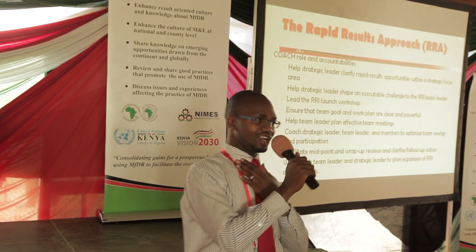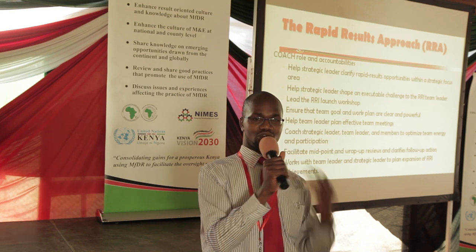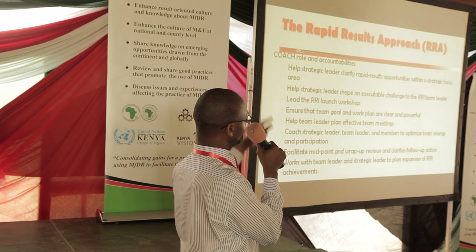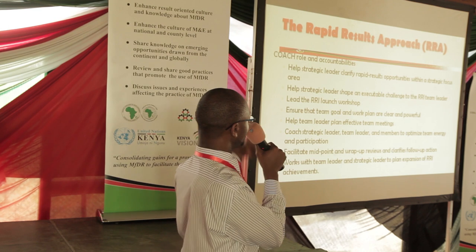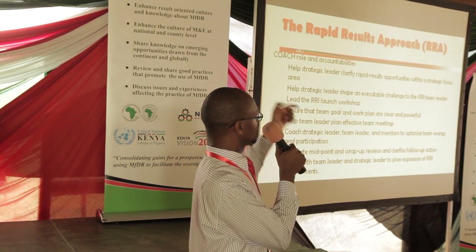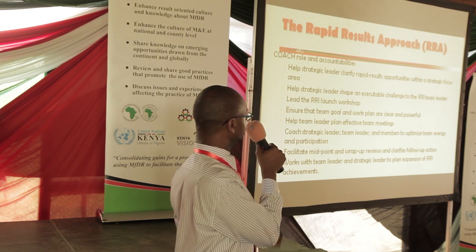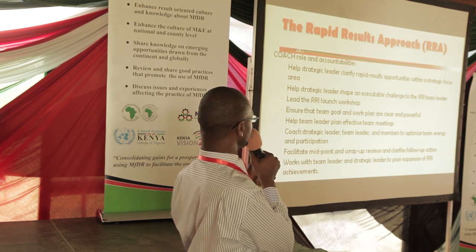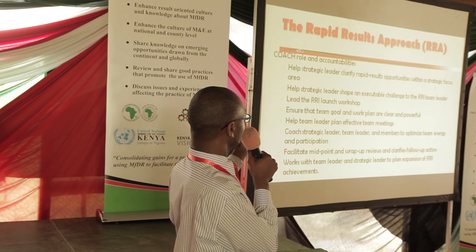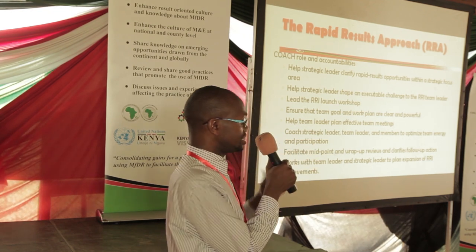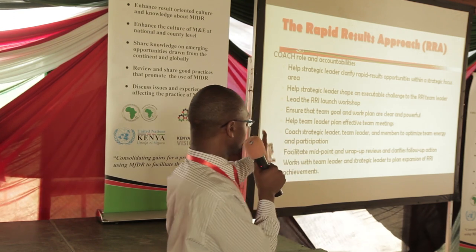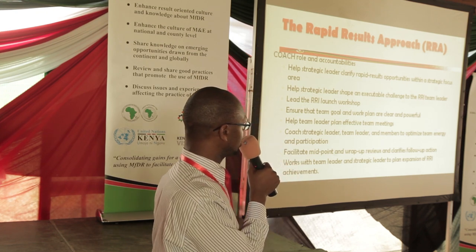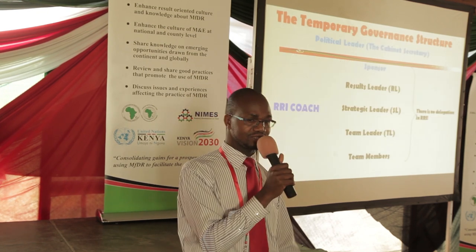If you are a coach like myself and you are coaching an RRI team, the responsibilities of a coach include helping the strategic leader clarify rapid results opportunities within strategic focus areas, help strategic leaders shape and execute challenge to the RRI team leader, lead RRI team launch workshop, ensure that team goal and work plan are clear and powerful, and also help team leaders plan effective meetings, coach strategy leader, team leader, and members to optimize on energy and participate, and of course facilitate the midpoint and wrap up reviews and clarify follow-up actions, and help the team leader and the strategy leader to plan expansion of RRI achievements, what we call scaling up.